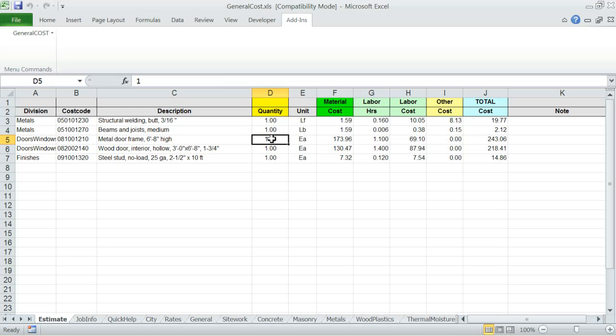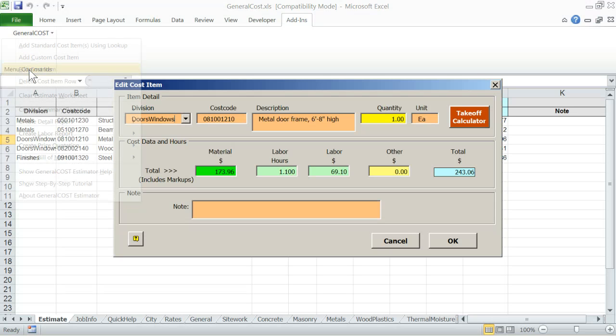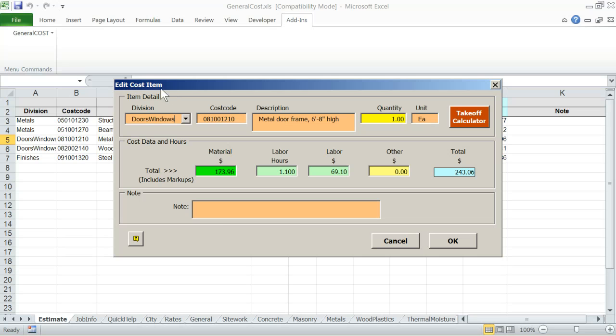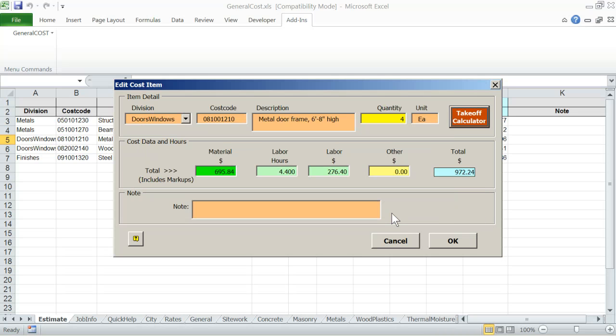Click the mouse anywhere on the row, then select edit cost item from the general cost menu. The edit window will open. If you know the quantity for that particular item, then you simply enter it in the quantity field. Or you can use the takeoff calculator to figure out the count, length, area and volume with adjustments. And you can transfer that right into the quantity field. Let's cancel this for the moment.